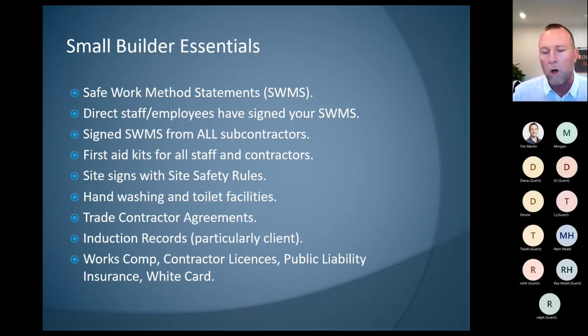So I would be saying to whoever's managing the payments for your business that we need to know these things are up to date prior to releasing payments to contractors. And that's just a gatekeeper for that process. I mean, a good contractor is going to provide these things, but if they're not there, that's where you're relying on your accounts payable team to back you up and ensure compliance in that space.